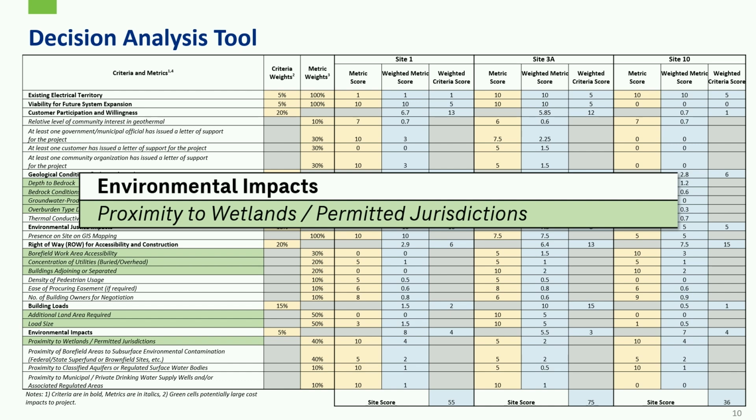Because if you're a utility and you start digging up someone else's material, I have to imagine that someone else is gonna say, well, you're the generator now, not me. And the only way I'm gonna build this system is if you get rid of all that material. It's not always a ton, but it can be the difference between the project being a good site and maybe the project going to a different site.